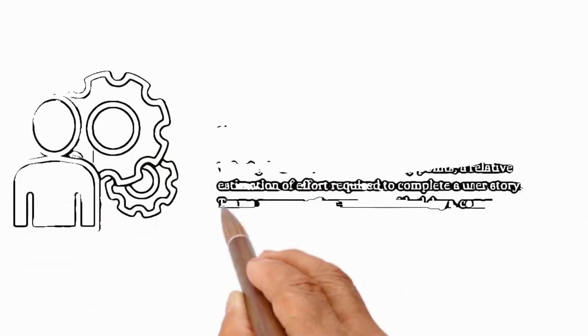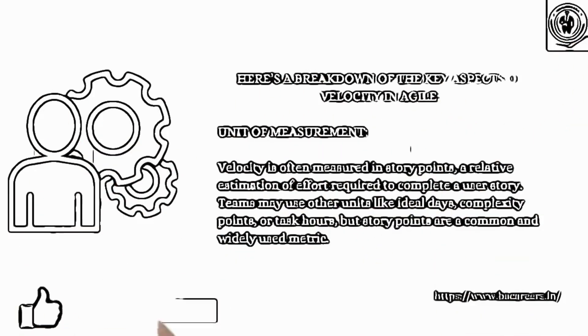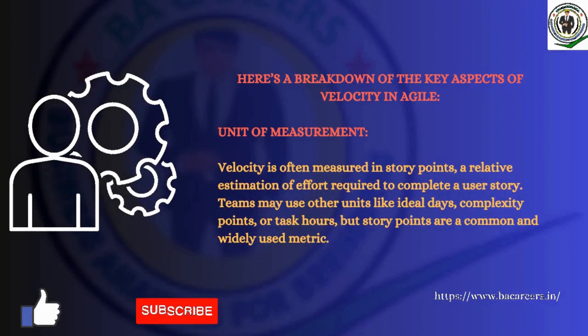Here is a breakdown of the key aspects of Velocity in Agile. Unit of Measurement: Velocity is often measured in story points, a relative estimation of effort required to complete a user story. Teams may use other units like ideal days, complexity points, or task hours, but story points are a common and widely used metric.